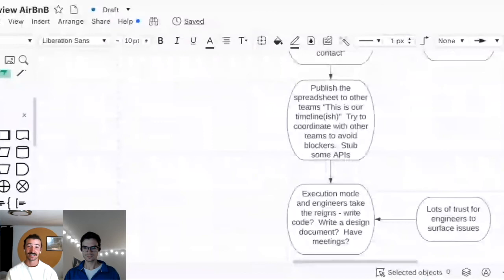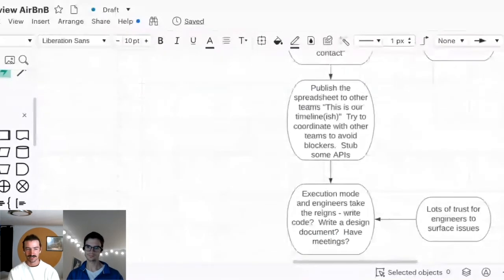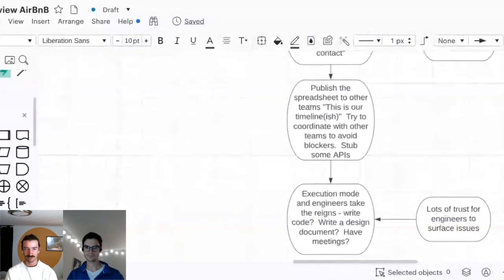I actually didn't think this was a particularly heavyweight process, and I thought it was pretty good overall. I think the key thing with this process is you have to recognize that estimates will generally slip, because, like I said earlier, you can only go so far ahead of schedule, but you can get really far behind, and then everything gets pushed. Your leadership has to understand that, and you as a team have to come to a collective decision about how much effort you want to put into making really accurate estimates, recognizing that will take away time from actually doing the work itself.